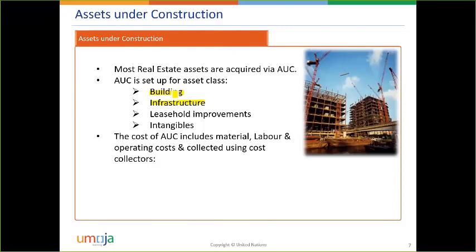How do they know what is the value of the building? We are looking at the cost: the materials that have been used, contractors, consultants, labor, any type of service, but also materials. That's why you as inventory managers have to be aware of the process, because there is a special way of doing MIGO, of doing goods issuing, that would impact the cost of the project. All right? So is this clear?